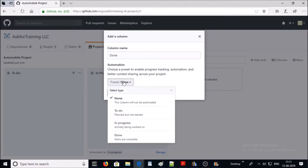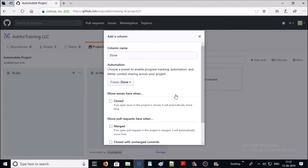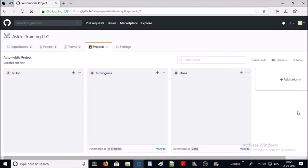Let's add one more column called 'Done'. For the automation I am selecting 'Closed' — if an open issue in this project is closed, it will automatically move here. Go ahead and create the column. Once your project board is ready, you can start to discuss with the project manager or developer team about the project life cycle.